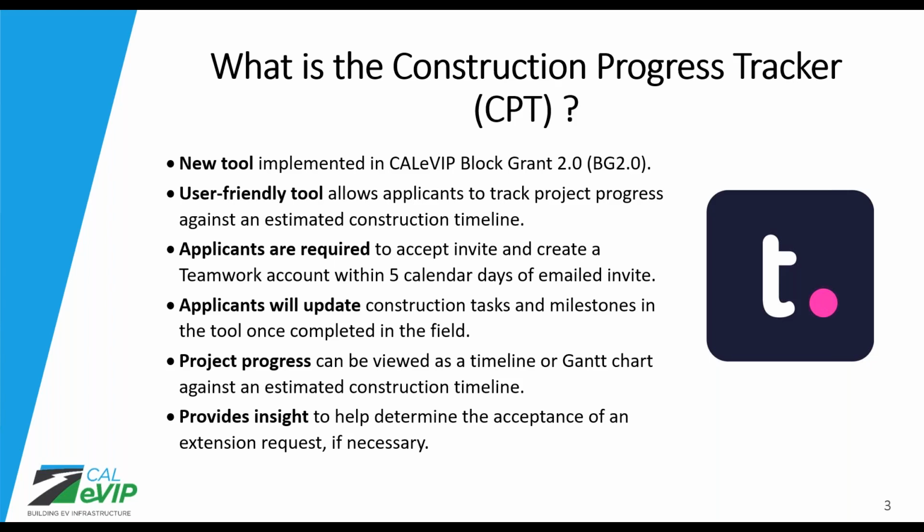Sign up is extremely simple. You'll see it in the next slide, but basically you just click a link, give your name, create a password, that's it. Once you're signed up, you'll update construction tasks and milestones in the tool once they're completed. Very simple, simply checking a box. And you can view your project progress either as a list timeline or as a Gantt chart and compare it to estimated construction timelines.